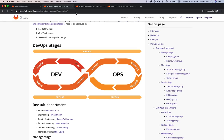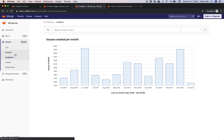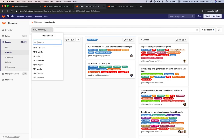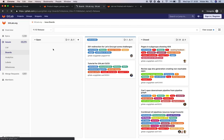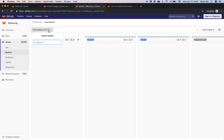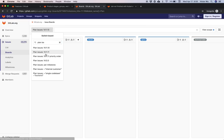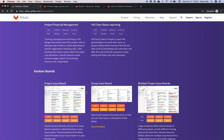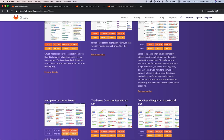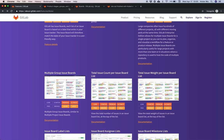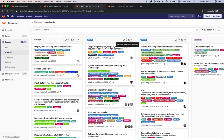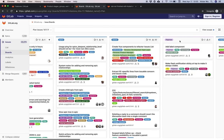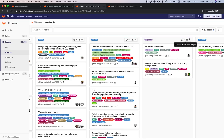Issue boards are a really awesome feature inside GitLab. You can see them at the group level and at the project level. Per list, you can see the issue count and the total issue weight — for example, 5 issues with weight 15, 10 issues with weight 30, and so on.